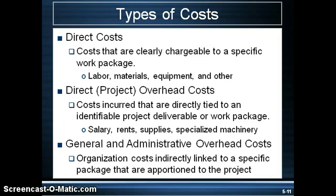Labor to do that work — to install all those items — is a direct project cost. The equipment used to do the work, such as bulldozers for excavating, forms for the concrete, compressors for air tools and the tools themselves, are all considered direct project costs. Direct project overhead costs are a little different. These are overhead costs such as salary for the project manager, temporary rental space for the project team, etc.